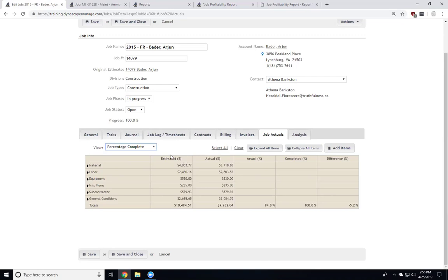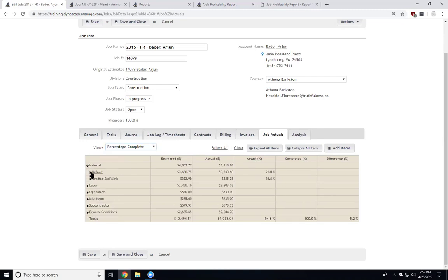Then we have the estimated cost, same as before, estimated cost and approved change orders. This actual cost here, based on my approved timesheets, is the actual cost of material, of labor, of equipment, whatever's in there, all that's detailed. Now, this actual percentage, if I expand down to the work area, gives me what percentage of my cost have I already incurred, or have we already used. So we've used up 98% of our costs on there as well. This is the actual percent.